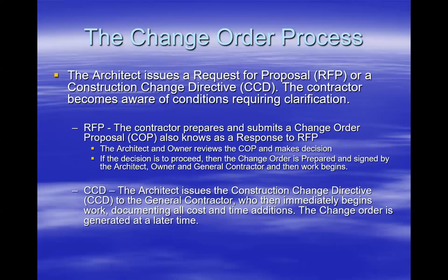But this is an important thing, even as a contractor, that we would want to sign the CCD before we started assuming more costs, generating more costs, because we're going to be responsible for that financial stuff unless we have some type of paper that's signed off.